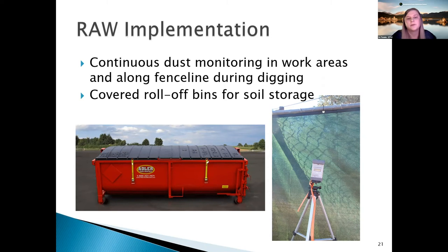And then if you're unfamiliar with these, this is the covered roll-off bin we are proposing for soils, or the RAW proposes for soil storage. This is the best way you could possibly store soil on the site. It doesn't have any plastic sheeting involved. Nothing can come out of it. This bin will be open, of course, when we're loading it, but as we said, it'll be wet loaded, so dust will not be coming out of this bin. And anytime it is not in use, it will be shut and sealed with the clamps down. And next slide, please.